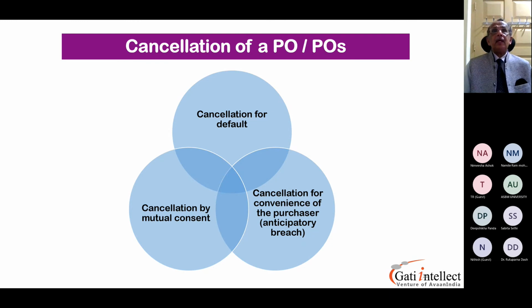Then, as a company, you have to send them warning letters. First warning, second one. Then the third one you can say, I'm sorry, if you still do not supply us within the next 1 month, or 2 weeks time, please consider it as cancelled. But the starting point is you try to mention it in the contract.